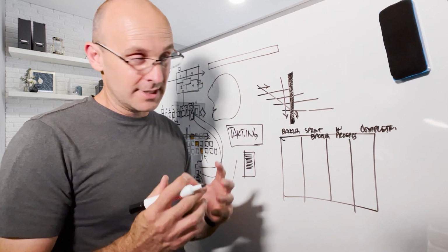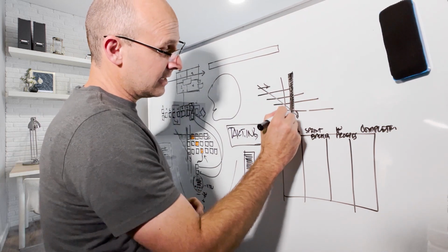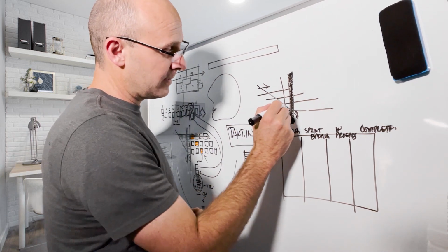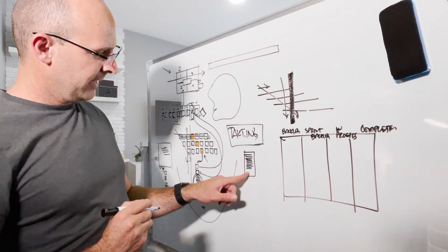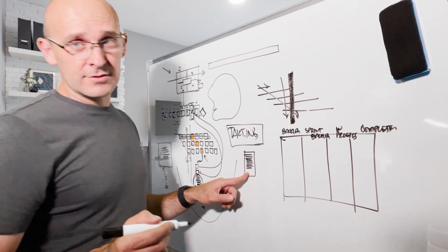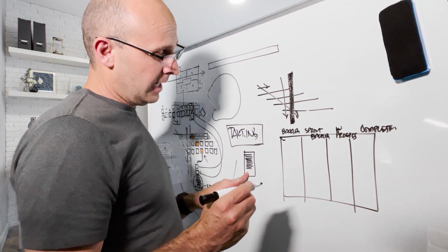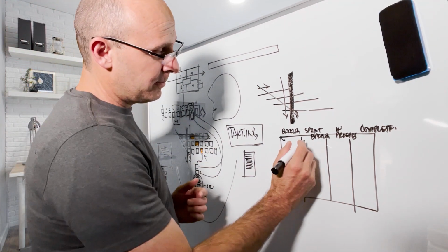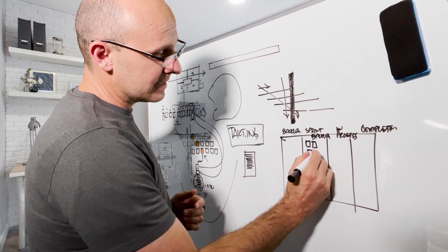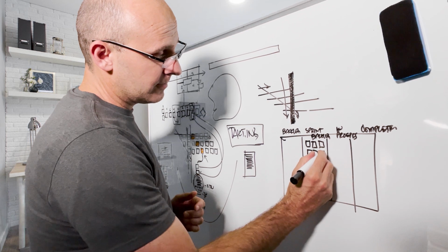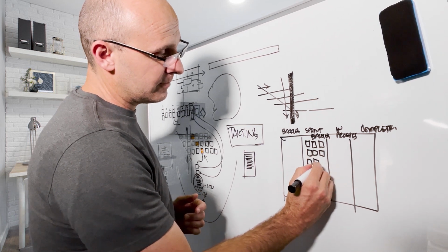If you're sitting down, the activities that come from the Takt wagons, the work packages, and the work steps, which are either in Excel or in your Takting software, or if you're using something like Timoti, you already have that pre-populated backlog. And whether you transfer that into tags and start doing the point system with the Fibonacci method,